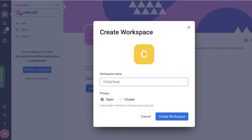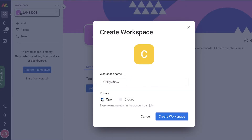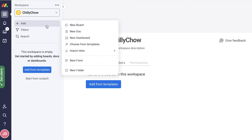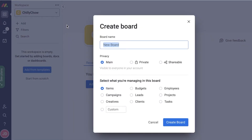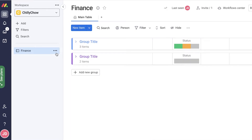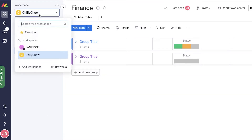Let's say the business is called Chili Chow. Once you've entered the workspace name, you can choose the privacy setting — open so every team member can join, or closed. Click 'Create Workspace.' Within your workspace, to separate different sections of your team — finance, marketing, IT — you can create different boards. Click 'New Board,' name it, and manage things related to that board. Within the board you can add multiple groups and sub-boards to categorize your work far more effectively.